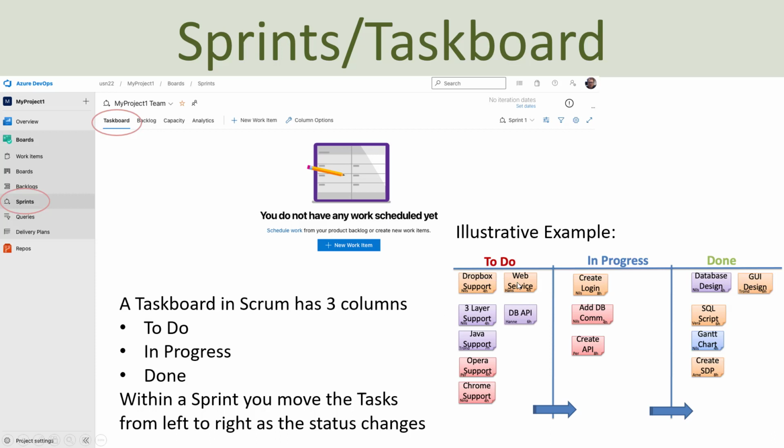And then when you start working on a sprint, you just select one of the tasks and put it into the in progress column. So these are the specific tasks that you are working on in that specific sprint at that specific moment. And when you are finished with a specific task, you just put it into the next column. It's called done. So here are the tasks that are going to be done.